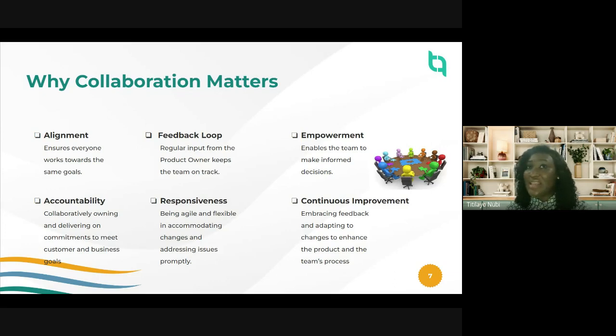Backlog refinements, some people call it grooming, is where you actually deep dive on requirements and break them down, talk about things that you have not even seen, or things that maybe the development team, or even the product owner itself, did not even think about. So it's a session where the product owner will get the feedback, or the development team will get the feedback, go back and check the code or check whatever, or one person goes to meet the customer to clarify a couple of these requirements and come back to the team to tell them this is the direction we are going on this particular thing. And by the time you are going into the sprint planning, you will not have any gray areas.